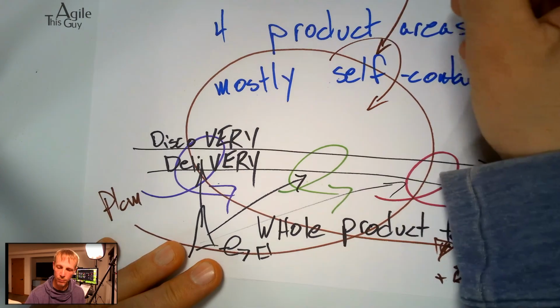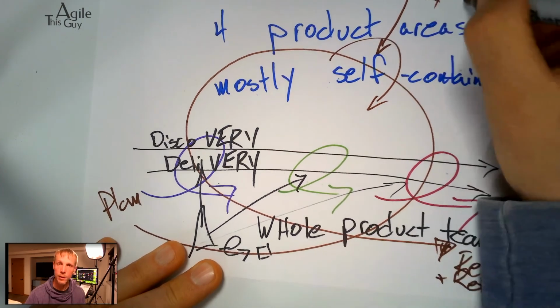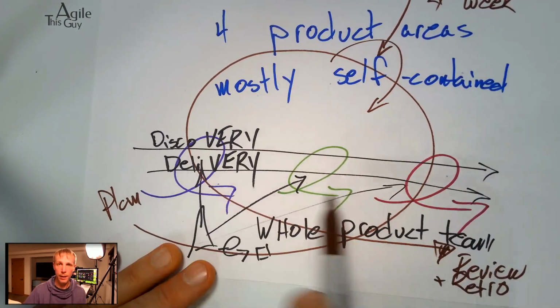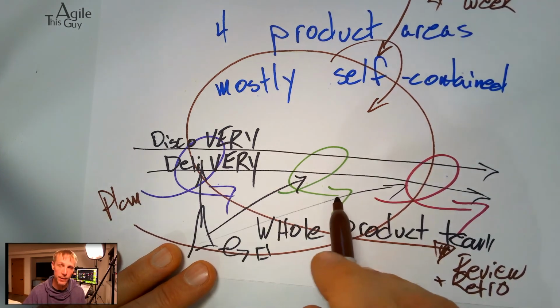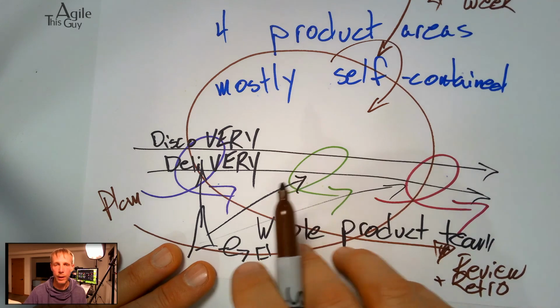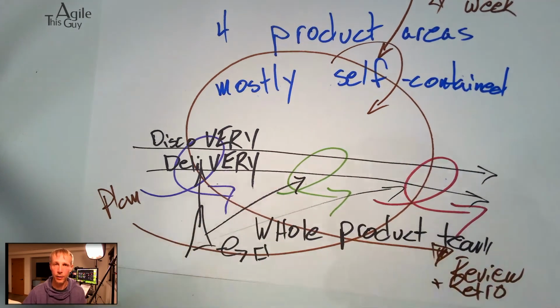And that meeting, meta stand-up, would happen about twice a week to make sure that any dependencies were cleared and preempted, impediments, and that we could continue to progress together as an organization and series of teams.